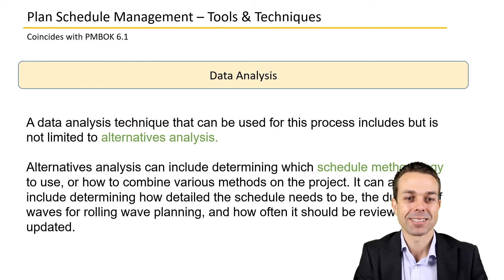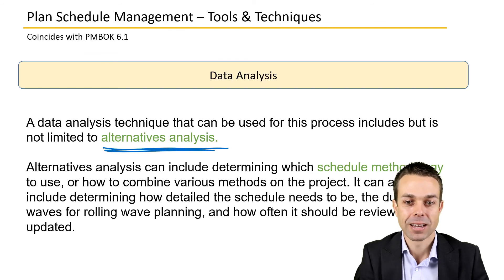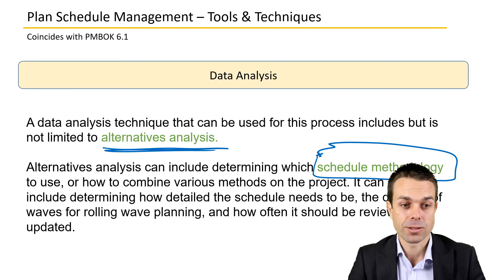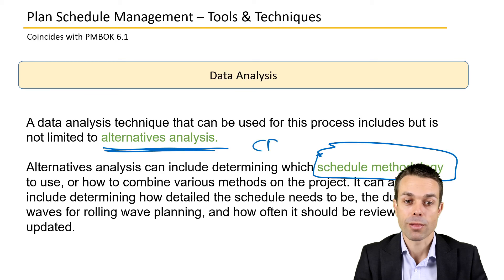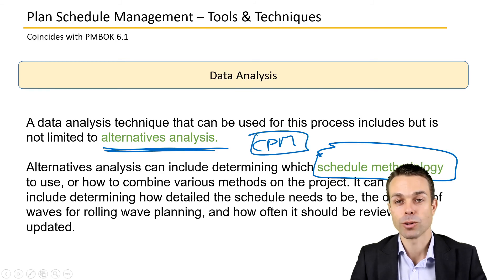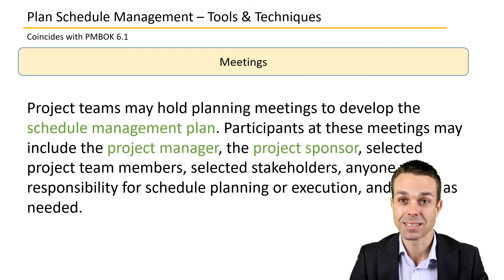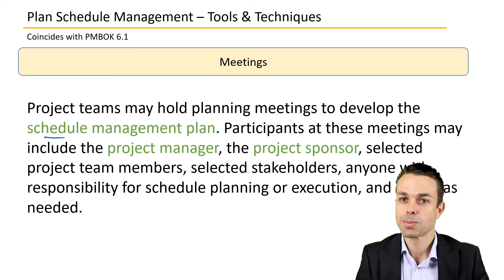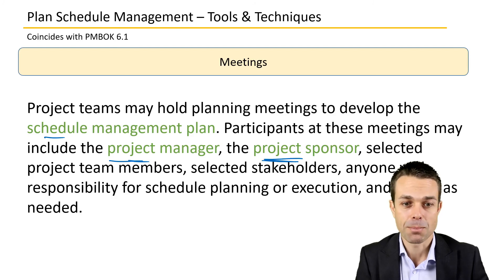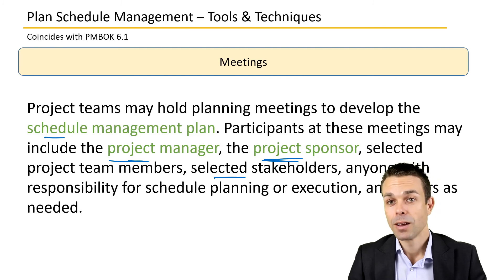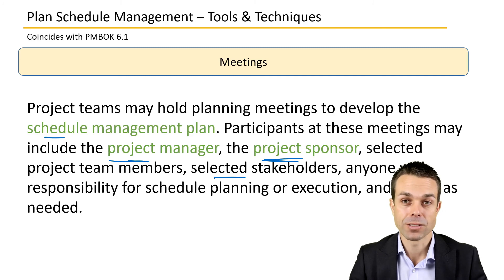A data analysis technique used for this process is alternatives analysis — determining which schedule methodology to use or how to combine various methods. Maybe we want to use agile, maybe the critical path method; either way we need to evaluate a few alternatives and pick the best one for this particular project. Meetings are also essential for gathering and dispersing information. Participants may include the project manager, project sponsor, selected team members, stakeholders, or anyone responsible for schedule planning or execution — meetings are often the fastest way to reach consensus.